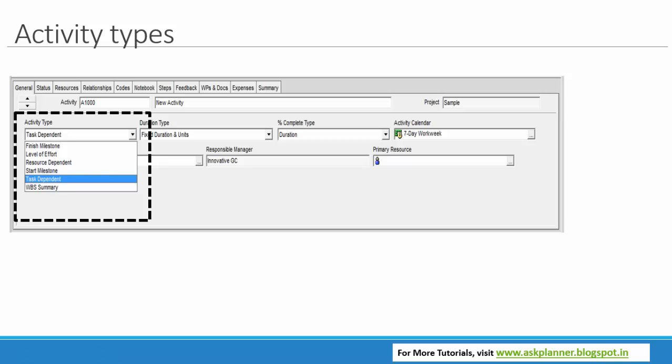Here duration is determined by its predecessor or successor activities. This resembles the physical works like meetings, kick-off meetings and different types of meetings, clerical work, measurements. These level of effort activities cannot be assigned constraints.